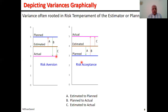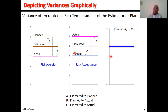Ideally speaking, all three variances — A between estimated and planned, B between planned and actual, and C between estimated and actual — shouldn't exist. In other words, ideally, all three lines on the graph should be very close to each other.